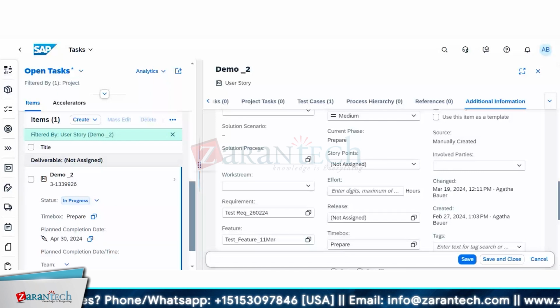For production movement, it will be with the SI partner and the customer. Obviously you are going to provide all the testing documents, everything, but even the actual change of status should be done by the customer side, the business process expert owner, right? There are many things, but you have to decide them, because if you don't decide one of them, it is going to create problems later on. Even for test cases, right?